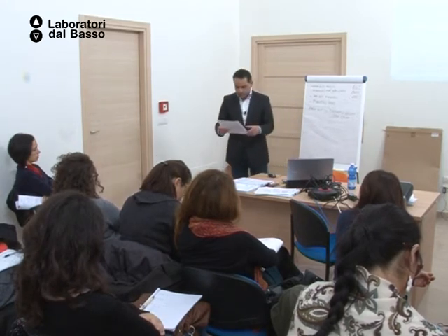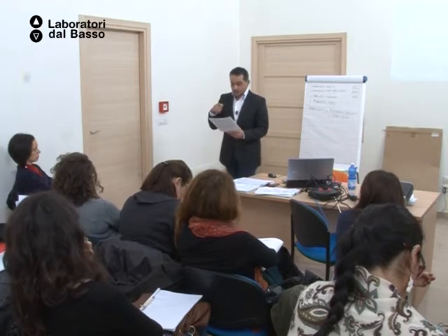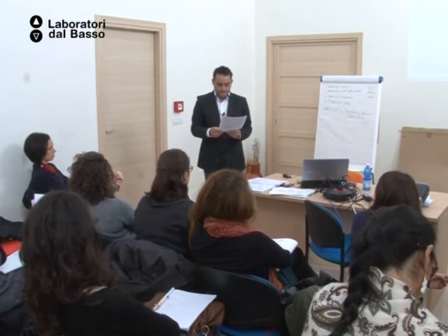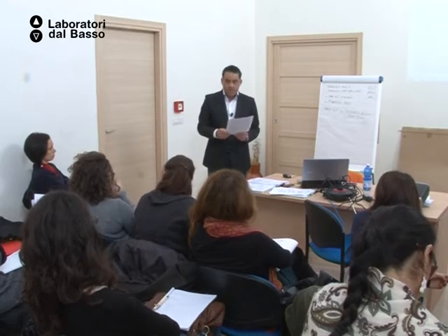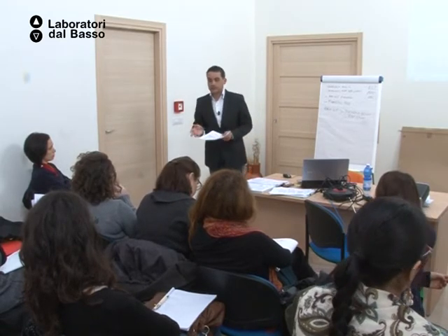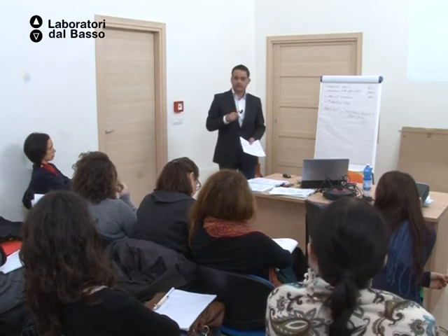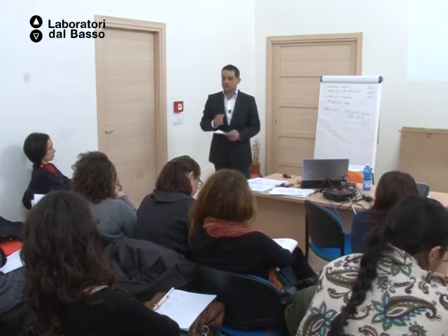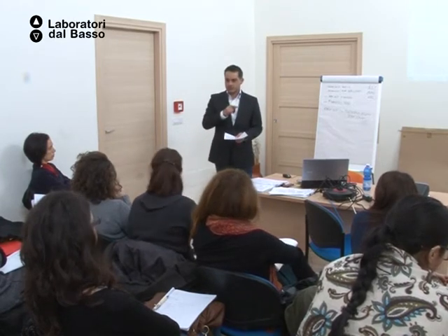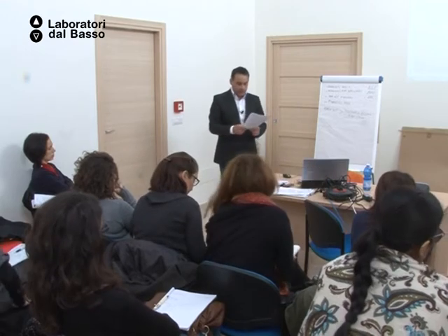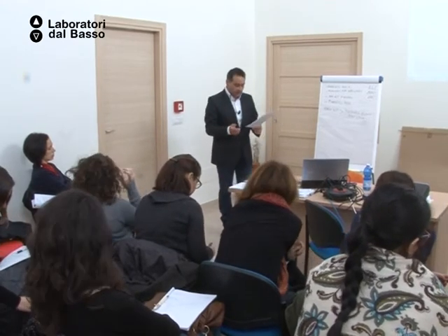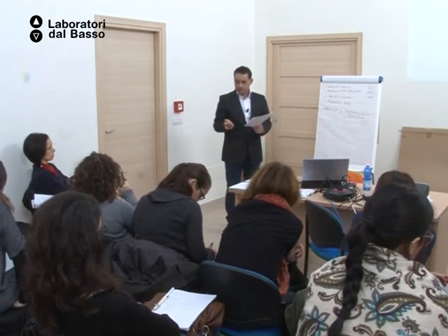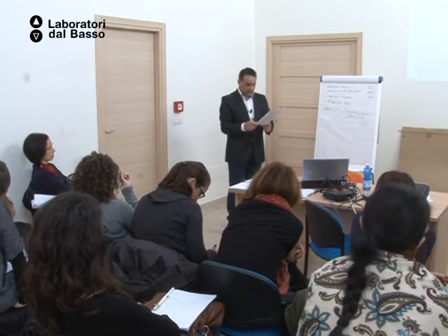Other basic rules. You start from 1 to 6. Also, if you have a third country part, you go to table 8, 9, because it influences table 10, etc. So it's kind of logical. It's a logical process. You will see that there are cells that you don't touch. The codes for the partners are P1, P2, P3. So you already have all this organized.